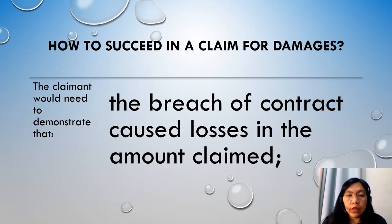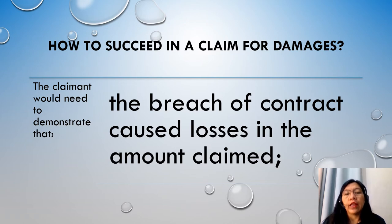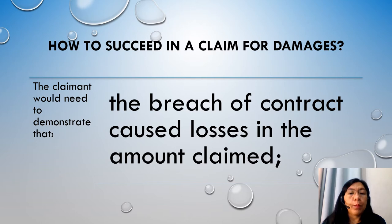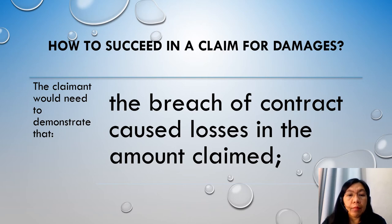According to the principles of the law of contract, the claimant must first demonstrate that the breach of contract caused the losses in the amount claimed. In English law, the purpose of an award of damages for breach of contract is to compensate the injured party for the loss, rather than to punish the wrongdoer. That is why we do not refer to liquidated damages as a penalty. The general rule is that damages should place the claimant in the same position as if the contract had been performed without the breach, so far as a monetary award can do this.